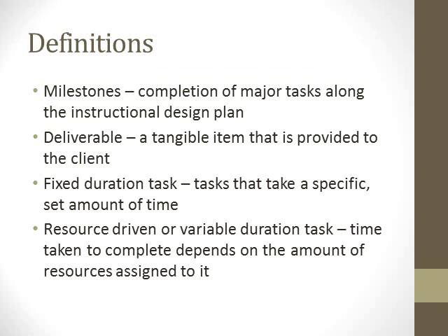Unlike a resource-driven task or a variable duration task where the time to complete depends on the amount of resources assigned to it. An example is writing test items or doing focus groups or learner interviews. If you have one person doing it, it could take a week to schedule and facilitate 7 different focus groups.